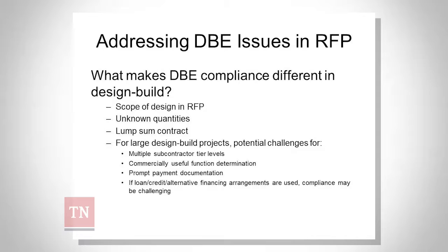So what makes DBE with DesignBuild different? Why is it so challenging to implement the DBE program fairly with DesignBuild? In a traditional process, we've got 100% complete design, right? Quantities, the contractor can look at the quantities, know what work he wants to sub out, what work could be done by DBEs. Everything's clear on day one when he submits his bid proposal, what can and should be done by DBEs.